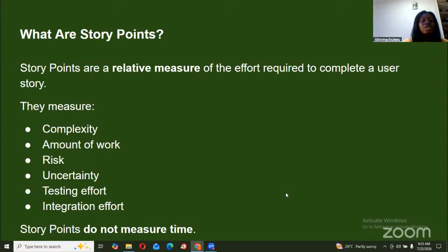Now, in a situation whereby the user is demanding that you integrate maybe a third-party AI API into an existing application, the uncertainty there is high. The reason is that, first of all, this third-party AI might be newly launched, so the team doesn't have much information about it. Secondly, they might not have done anything like that before, integrating an AI into an app. So they know very little about how to do this, which means that the uncertainty there is high.